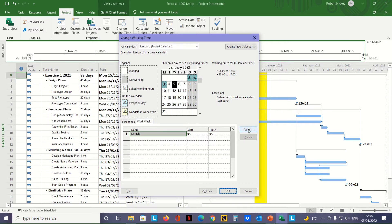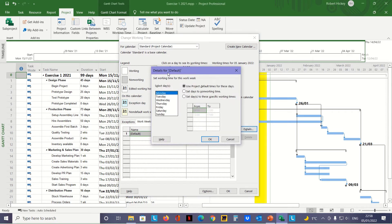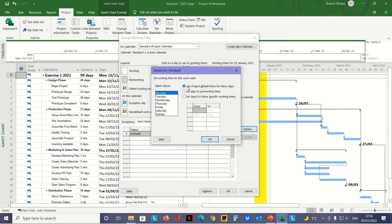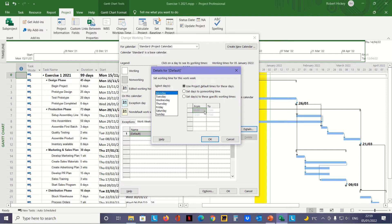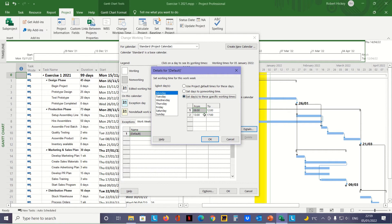We get the details for the default calendar working time. There are three radio buttons here, and the top one is selected: Use project default times for these days. We don't want to do that. We have to select the button at the bottom first because the times are grayed out and we can't access them yet. We need to select Set days to these specific working times. Once we select that, we have access to change the times.